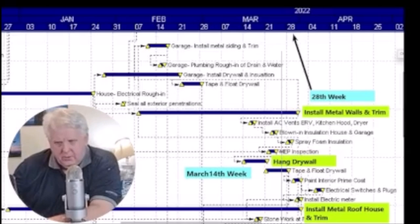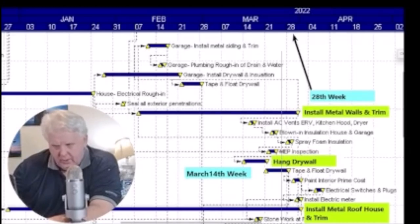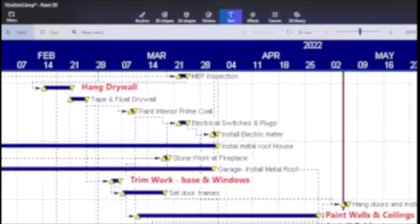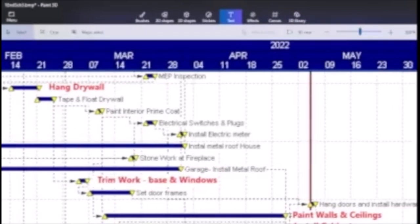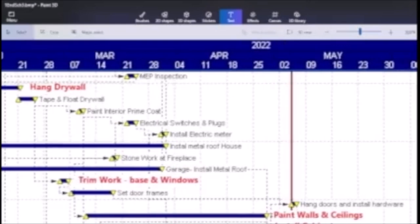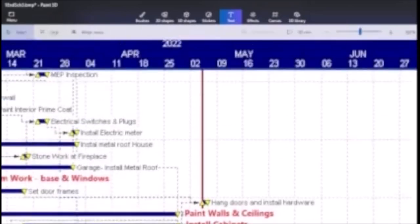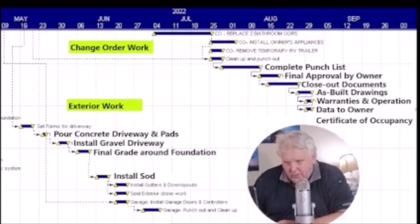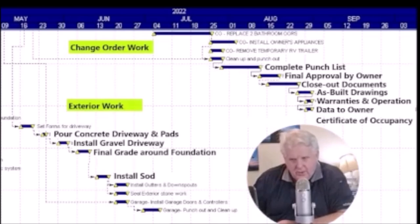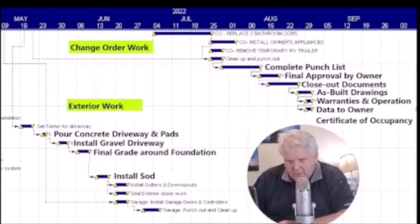You want to keep tracking the progress of your construction project and updating your as-built schedules. On the interior, we hung drywall and installed the exterior metal. On the overall tracking: tile work, interior painting, cabinet work, plumbing trim-out, and then the final items of the project schedule — the exterior work and the change order work. I started off with 100 activities on this schedule and ended up with 113 activities. It's just a matter of adjusting as you go along and updating. If you have change order work, you want to add those in also.